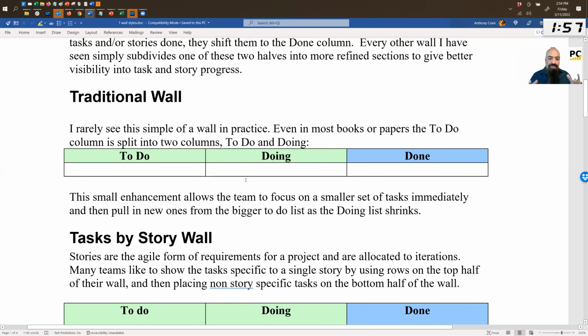We call that WIP. And so with WIP, the more WIP you have, the more delay there is, because there are things waiting and there's all this WIP and each of these items is taking time. And so it causes delay. If you only have one thing, then the next thing on the list only has to wait for that one thing to get done.